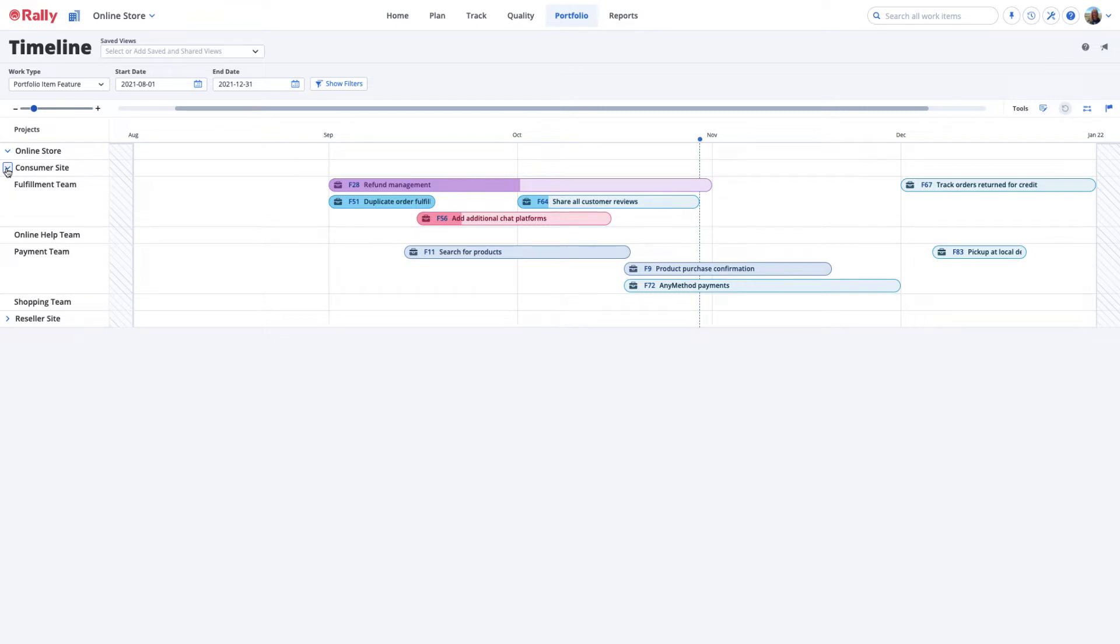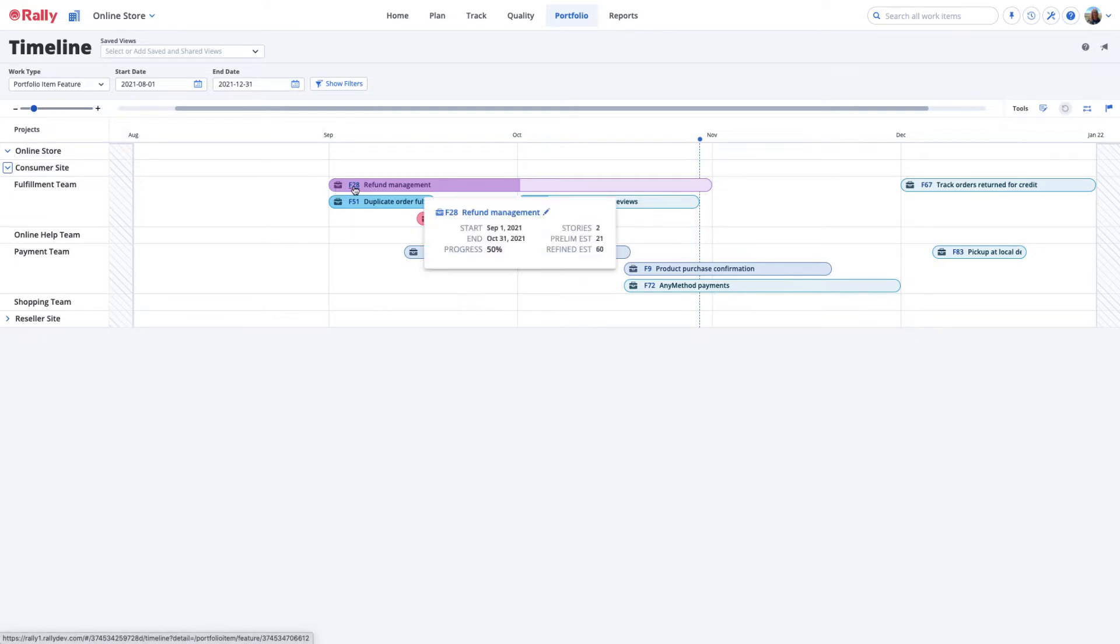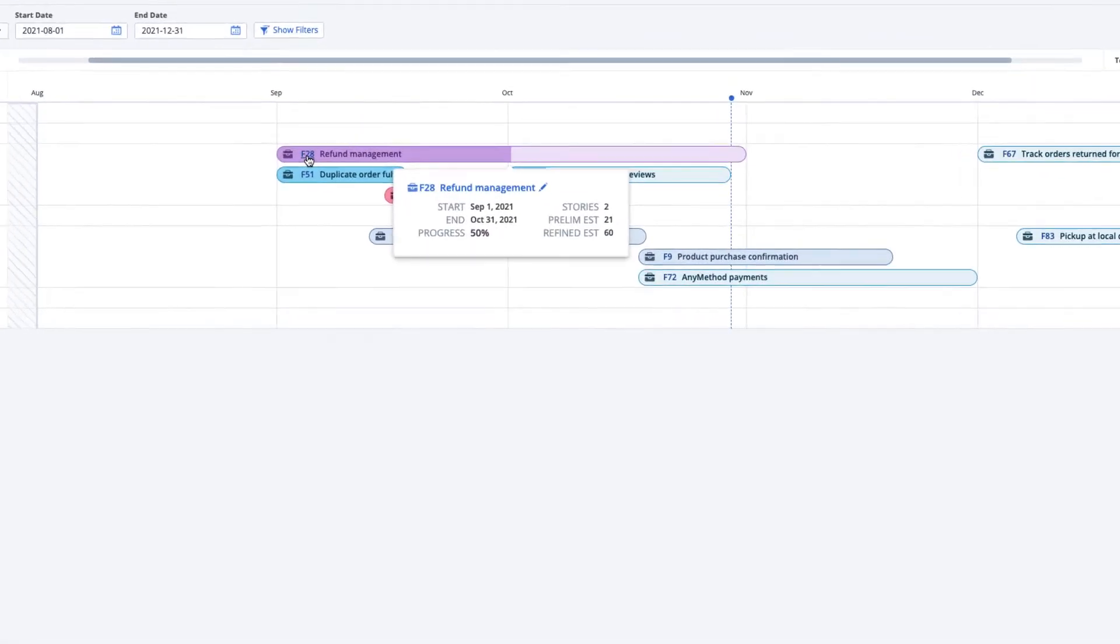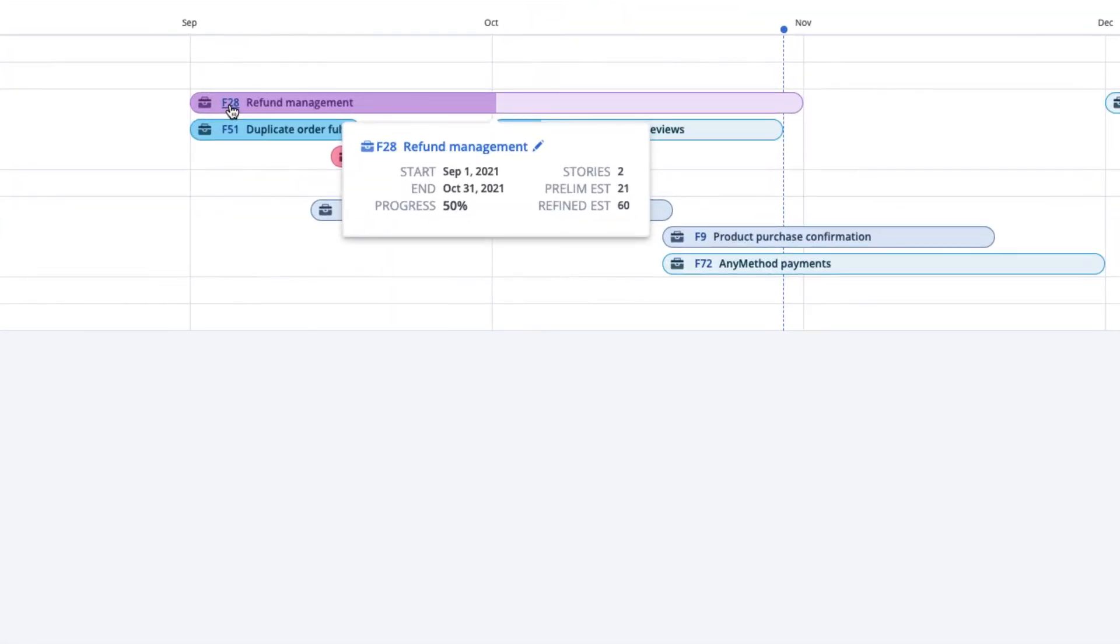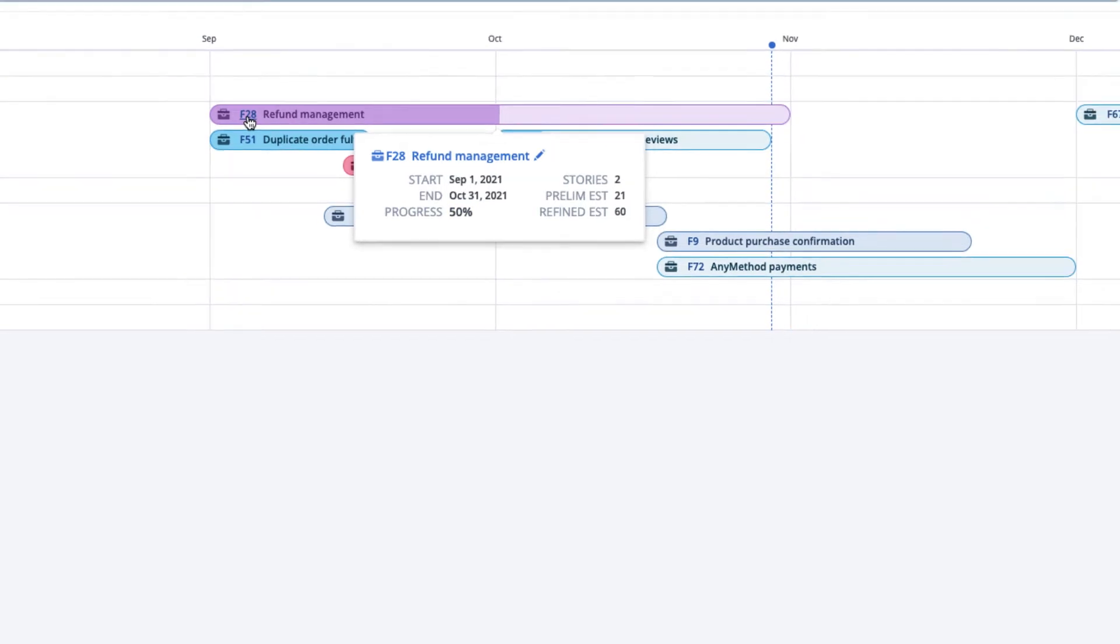To view the details of portfolio items in your timeline directly from the Timeline page, hover over the Portfolio Item until a pop-up window appears with summary information. Progress is measured by the total number of story points accepted divided by the total number of story points assigned to stories associated with the Portfolio Item.